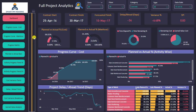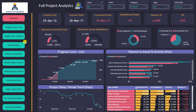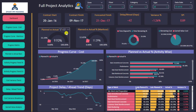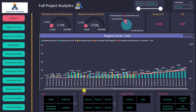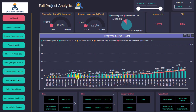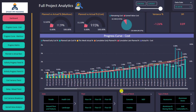What I'm going to show you now is how you can carry out more advanced and complex analysis — you can basically do anything you want in project control with one click. Let's go to the detailed progress curve. I can see the planned percentage on a weekly basis based on early and late dates, actual, as well as the cumulative for planned and actual.